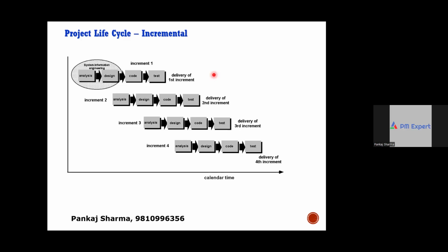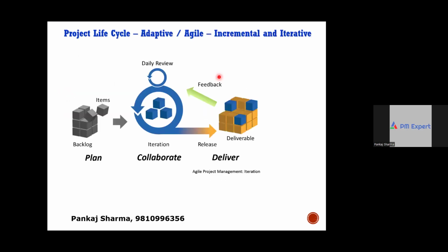In those situations, what to do? You have to further break the phases into small iterations. Instead of phases, you have small iterations, and the iterations have to be less than a month, like 2 weeks. Though the most popular cycle duration is 2 weeks, they can go down to a week also, but definitely less than a month.